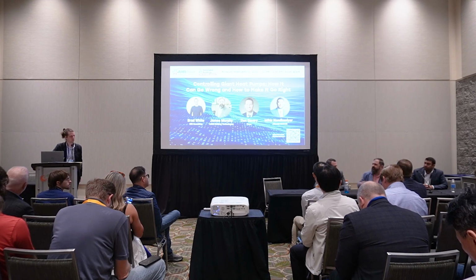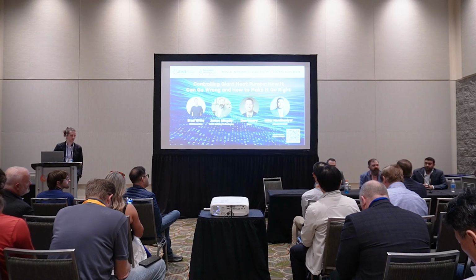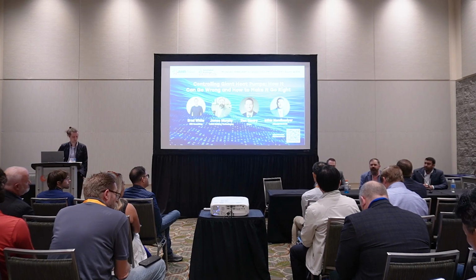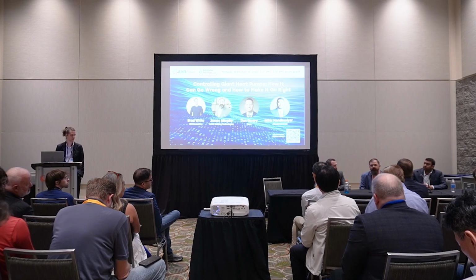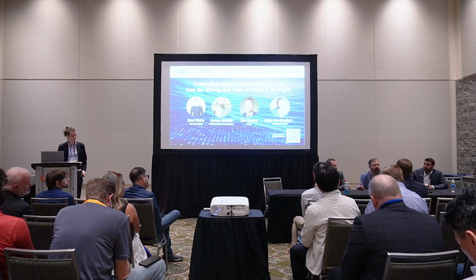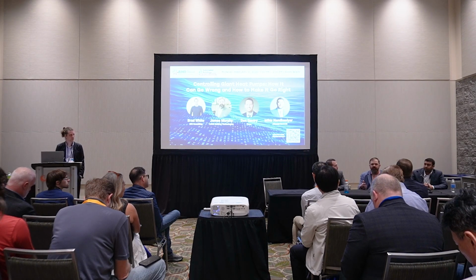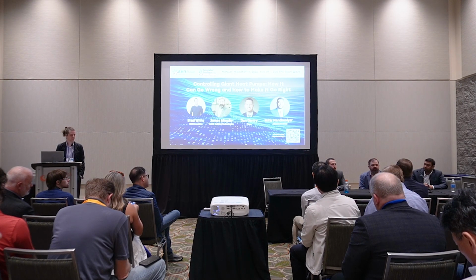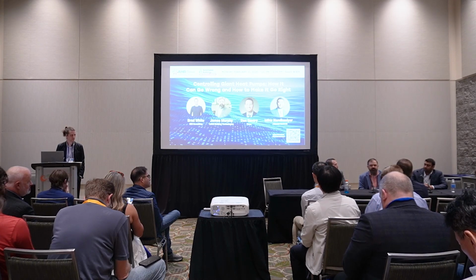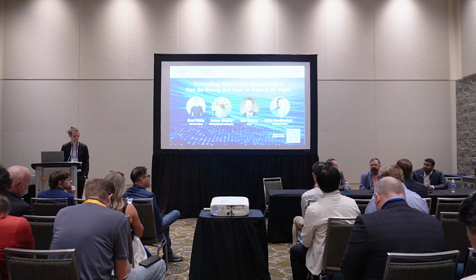We run into a lot of the similar problems where we're not making enough heat. But the biggest one we run into is that the heat pumps don't turn on when we need them the most, which is problematic. Having a plan for that is a big challenge, but challenges can be overcome. It's just the hard no's we have to think about ahead of time, and we have to get way ahead of our projects, where we're having these discussions with the owners and the people who are driving the drive to clean heating and clean energy. If we have these conversations way ahead of time, then there's an acceptable amount of risk we can all go into the project with. But if we wait until it's installed, a lot of people might have objections to those risks. So that's where I'm coming from, and hopefully we'll have a great discussion today.